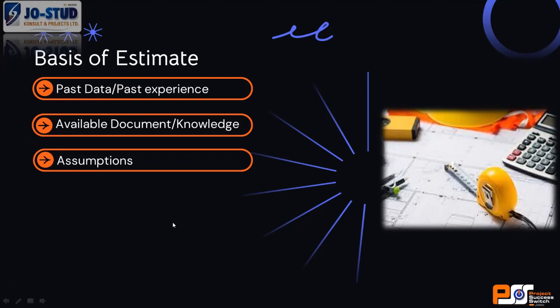What do I do in the assumption page? I will say something like, the above costs are based on the following assumptions. Number one, that your project site, the ground is stable and the degree of slope is between 2 to 5%. Why? Because that is what is obtainable in the most recent project I completed. Number two, I will say that the soil is not waterlogged. Number three, I will say when I did a soil test on this project, the bearing capacity was XYZ kilonewton